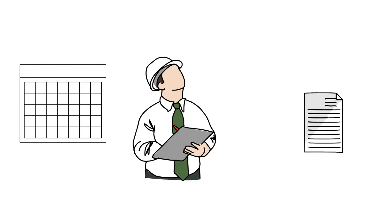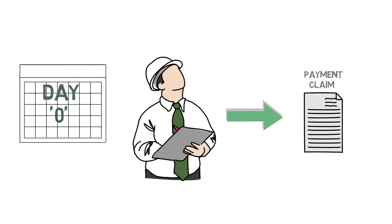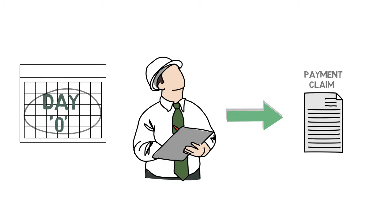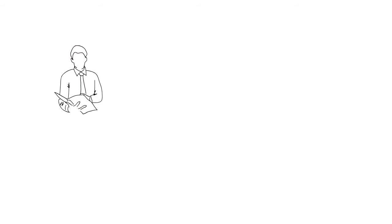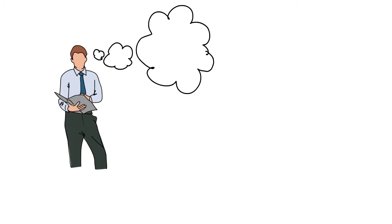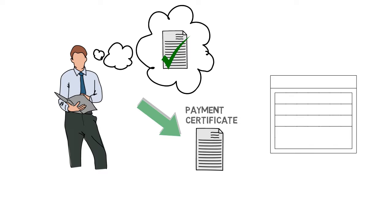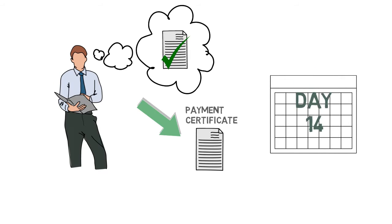The monthly payment process timeline is fixed from the day the head contractor submits the payment claim. This is referred to as day zero. The superintendent's representative assesses the payment claim and is required to issue a payment certificate within 14 calendar days, or in other words, before day 14.